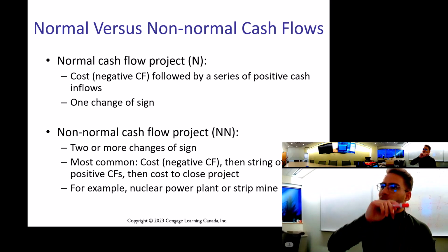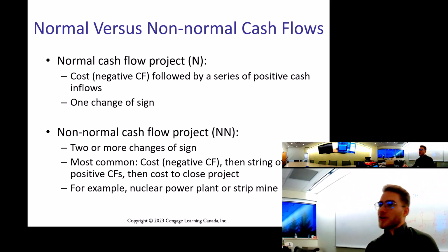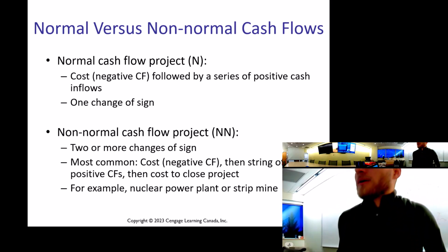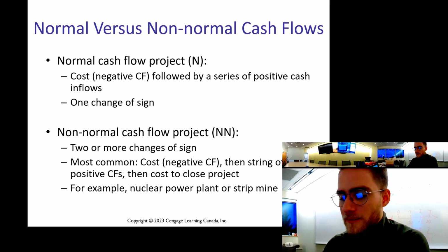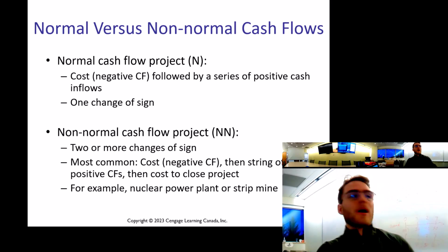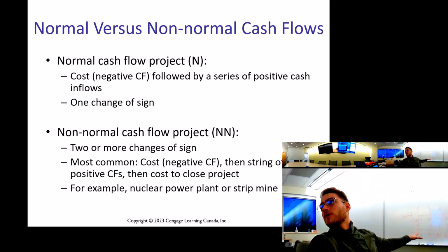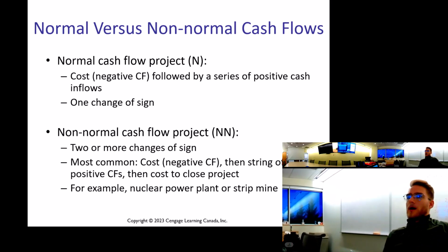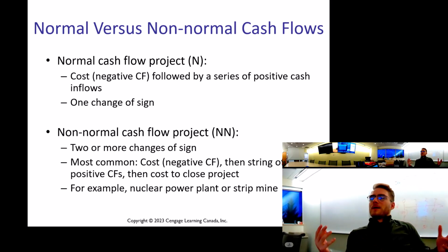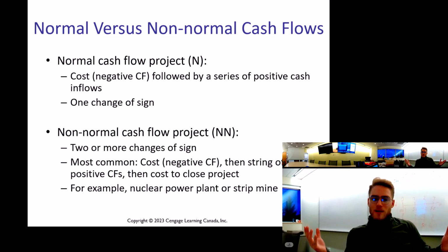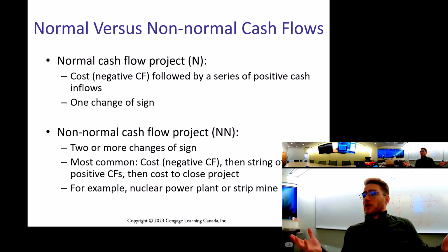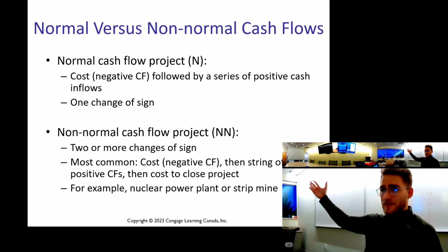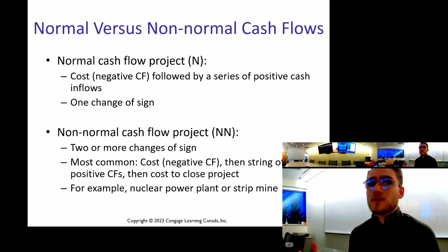That inherently curves your NPV profile, and you can end up with two internal rates of return in that circumstance. So when you have that type of abnormal project with cash outflows into the future, which is common, like when you have to retire an oil rig, or return an environmental property that you own back to its original state, that's a future cash outflow you have to incur, and you have to factor it into the project because it's a result of taking on the project.